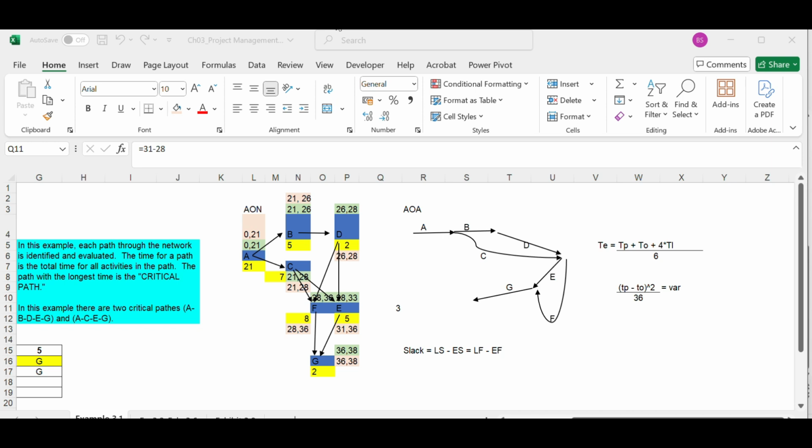Another problem in duration estimation is not reporting the early completion of activities. This may be due to the project culture or the project communication plan. We can improve the culture, organization culture, and the project culture, or we can improve the situation with having more contract incentives. If you complete the activity before time, you will get some incentive. This way, we can improve the progress reporting.